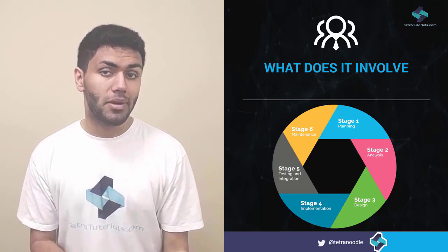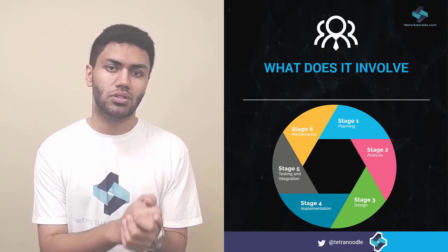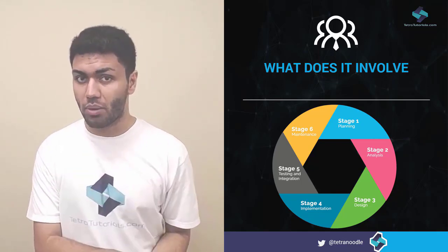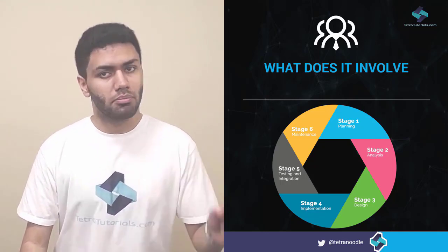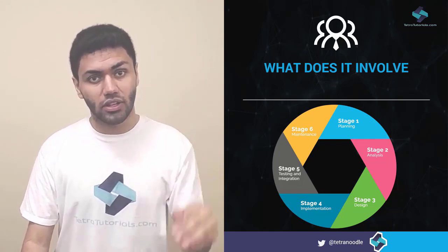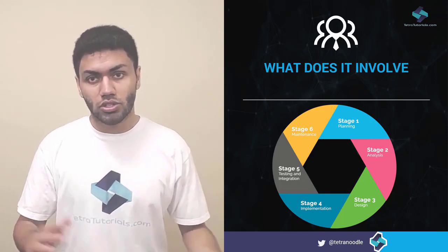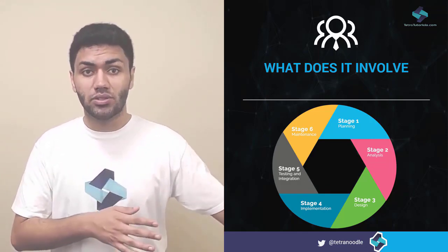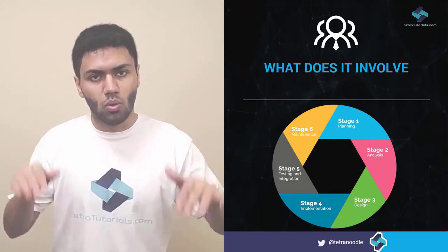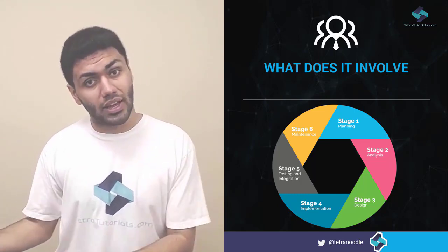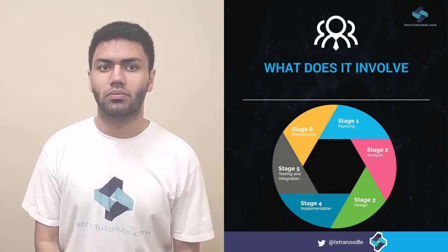Planning also involves making sure all the required resources are in place to be used at the right time. For example, if testing of a specific feature of the software is planned in about 3 months from now, the project manager has to plan for the availability of the test resources like the program, the server, and so on, so that when the project needs these resources, they're available readily without any delays. The more the project manager focuses on the planning activities, the more efficient will be the project execution.